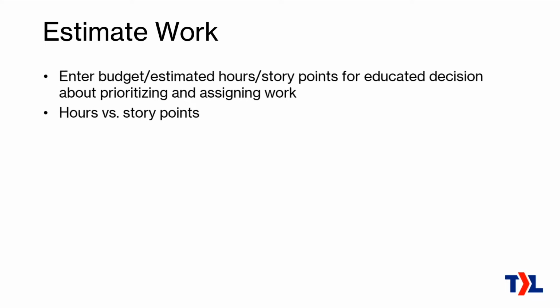Multiple people in your team should be able to look at that work and then give it a relative value against some of the work that you've been doing historically, to say, okay, this work is twice as complex as some other work, so you give it twice as many story points. The benefit of that is that it doesn't matter who does the work, compared to if you're estimating hours. There's a lot more that could be said about that, but I don't want to say too much. If you find a book about Scrum, then definitely you'll read about that technique.